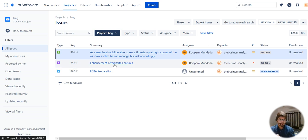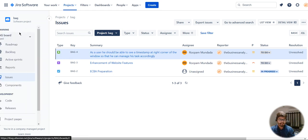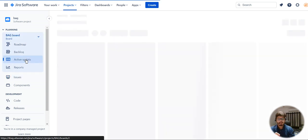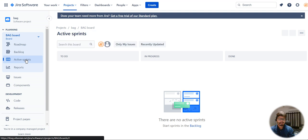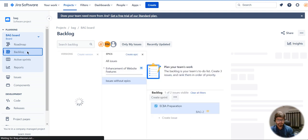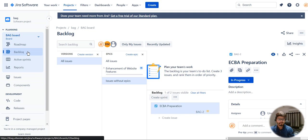The story is assigned but it is in to-do. When I go to active sprints, you should be able to see the stories on the board, but there are no particular stories visible. When I click on backlog, any story you create goes to backlog first — you need to move that story from backlog to the board.